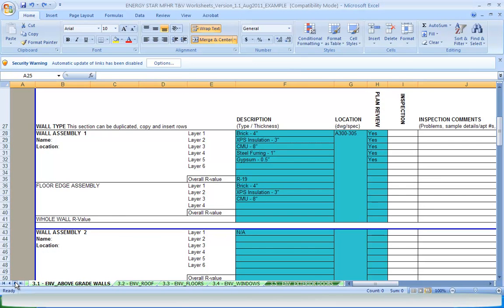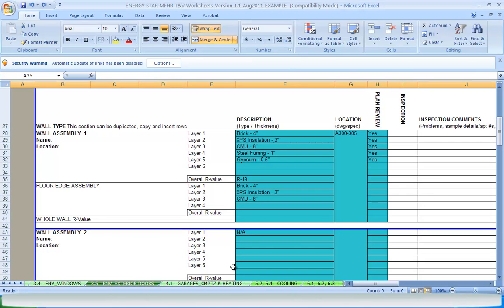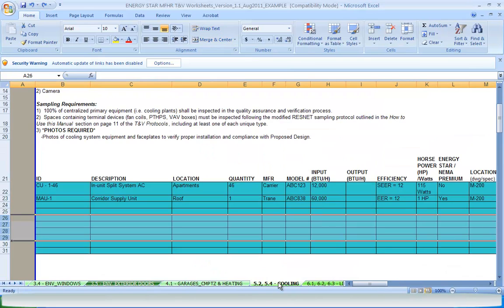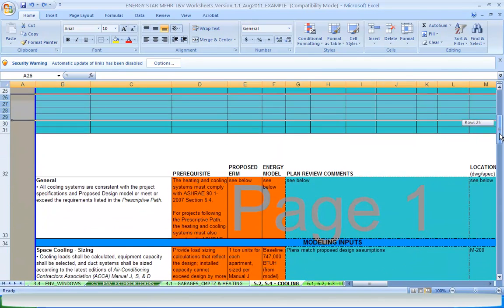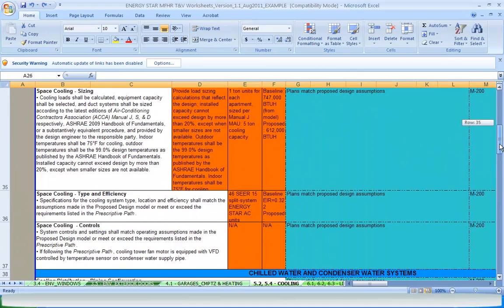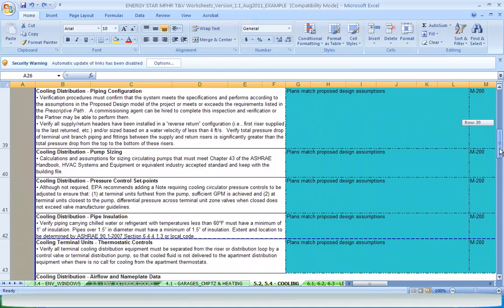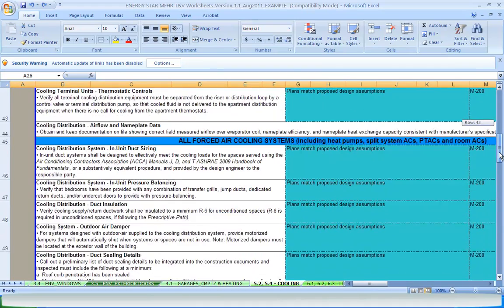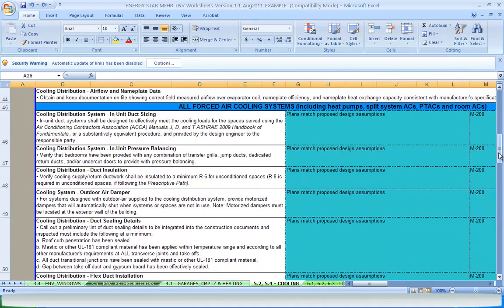For more complex building components, such as the HVAC protocols, there are no Notes for Drawings and Specifications section because there are too many notes to put in one cell. So each requirement has its own row as well as a place for a plan review and inspection comment.